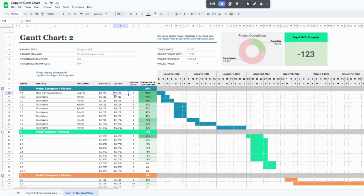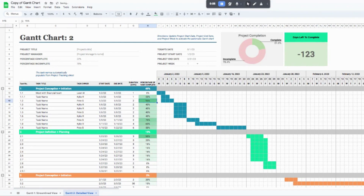The start and end dates work the same, and the days automatically calculate for you. Over here you have the percent of the task that you have completed. This ranges from zero — where it shows as white — up through increasing percentages, so the closer to 100% the greener it gets, and the closer to zero the whiter it gets. This gradient is automatically activated and provides a nice visual representation of where you're at with each task.